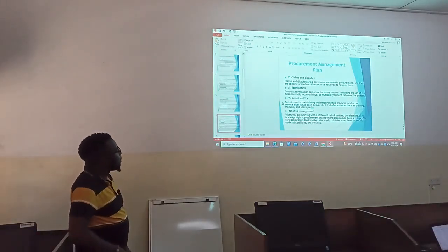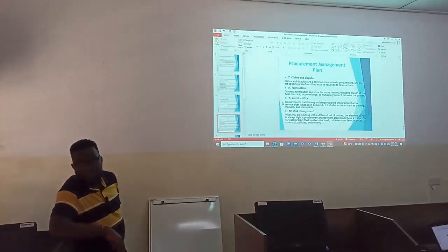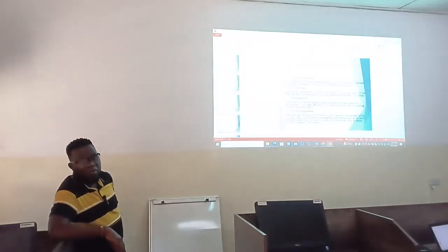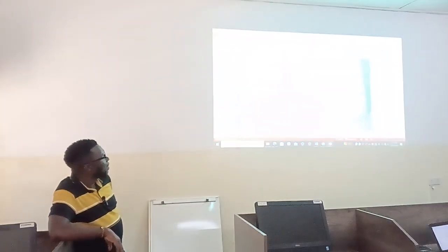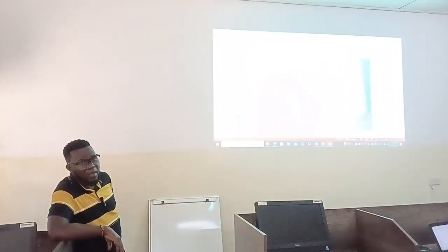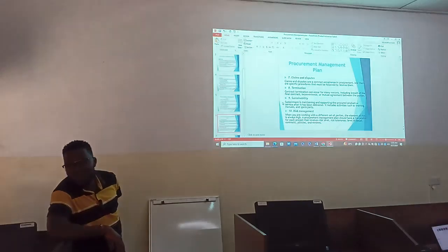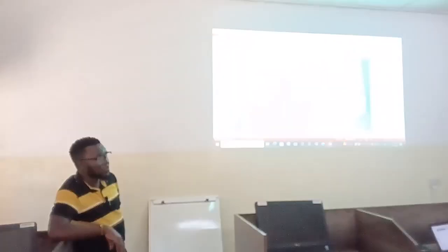Now, contract termination can occur for many reasons. The breach of the final contract or the breach of contract terms and conditions. There can be some other inconveniences that may happen along the way. And of course, just a mutual agreement between the parties involved.